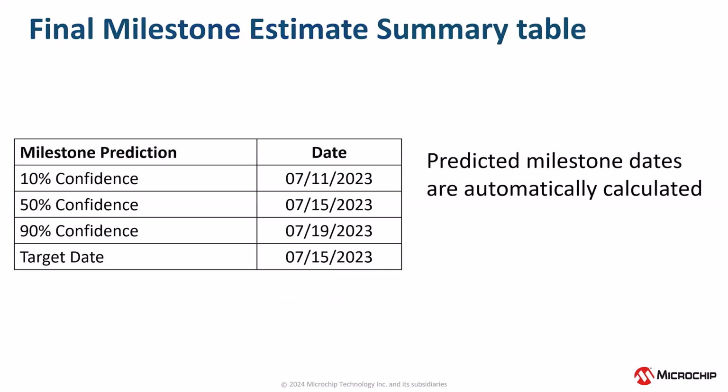The lines crossing the x-axis predict a date for each of the confidence limits. To be even more concise, a table with confidence limits was generated to summarize the results. Since the confidence limit curves are already mathematically defined, it was easy to determine with Maple where the curves cross the x-axis. These numbers were translated into dates and entered into a table. All this was done automatically using Maple.